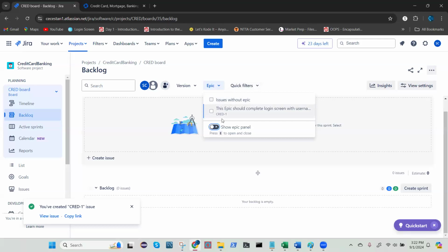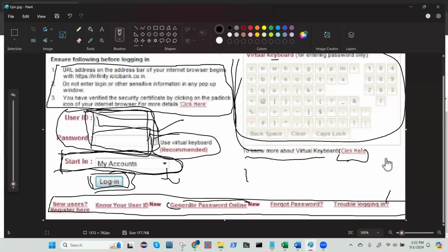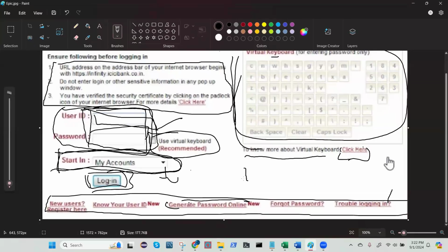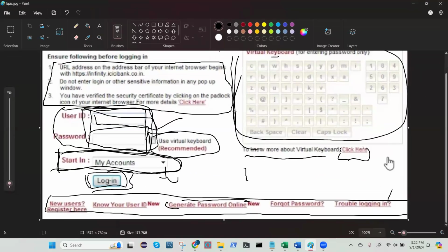So that's our epic. If you want to check these boxes, you come up to this issue type, and you say this is an epic for us. Now this whole epic, we have created an epic for this particular login screen. Breaking down this login screen is what we call user stories. So right now, how to create user stories and tie our user story to this particular epic we are embarking on. These features, all these functionalities, we have to complete these things.